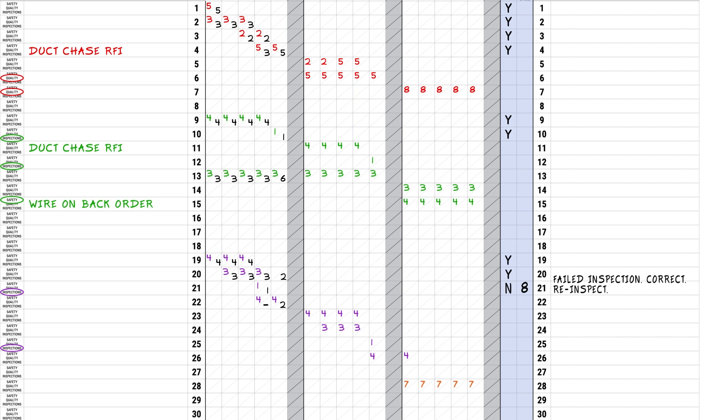On line 22, the insulators committed to having four workers on site on both Thursday and Friday to insulate area A. However, their mobilization was delayed until Friday, and they only had two of the four committed workers on site. With the reduction in committed manpower and duration reduced to one day, they will not be able to complete the task as promised.